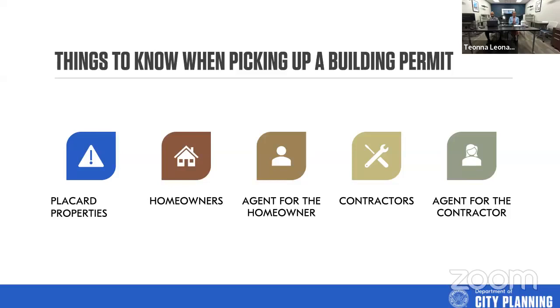So once construction is completed and we have passed all your inspections and issued your certificate of occupancy, you have to agree, sign an affidavit stating you will reside at that property for 2 years after that date. If for any reason you attempt to pull another permit at another address within that 2-year time frame, as a homeowner, you will be denied.